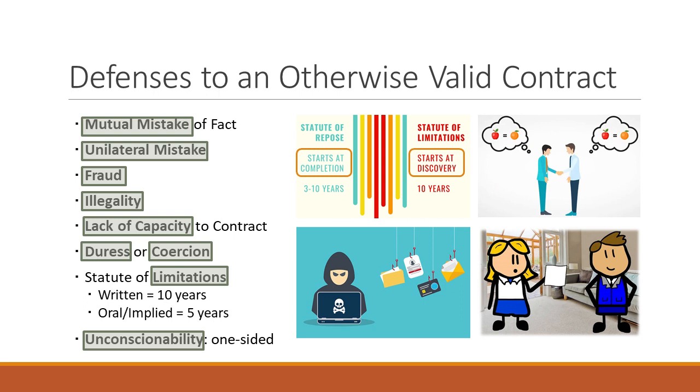And it's not open-ended. It's called a statute of repose, meaning you only have 10 years from the completion of the project to find a problem. So that ties back with the 10-year written contract.